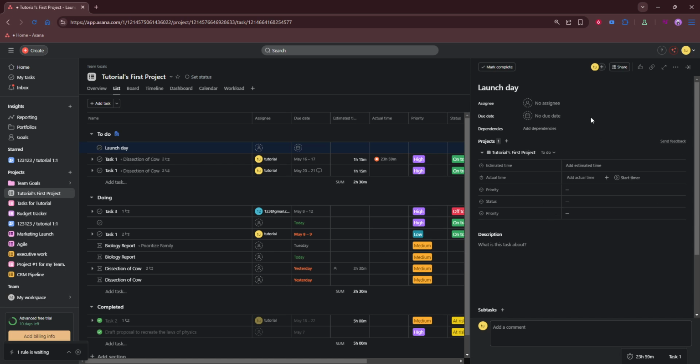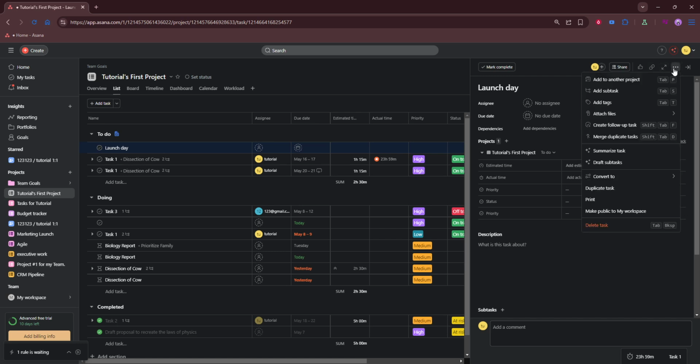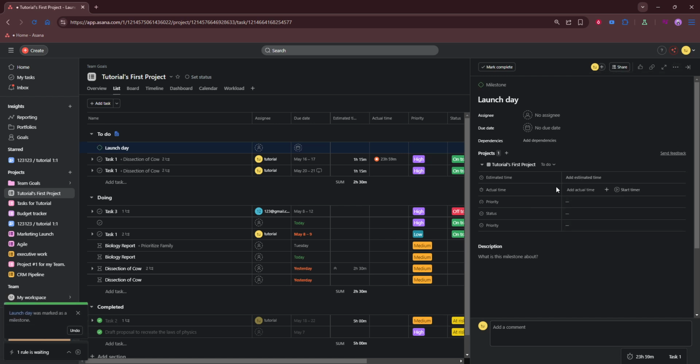Change the task type to milestone if that option is available in your Asana setup. You'll typically see a toggle or drop down that lets you convert a standard task into a milestone, often represented by a diamond icon. Converting it signals to your teammates and your project timeline that this item marks a significant event, not a list of to-dos.